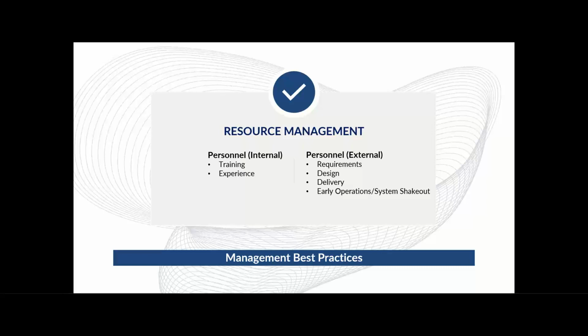Once the solution is delivered, early operations. When we talk about early operations, we're really talking about the stage in the project where the solution has just hit the door. The first release has just gone out. And in that case, we need to shake it out. We need to figure out what the problems are. But what you also need to do is plan that any of the consultants or outside staff you brought in to support the solution for the development, they're present. Because you don't want them walking away as soon as it's implemented, because there will be things that come up.